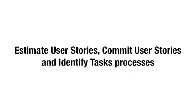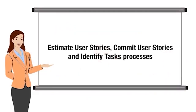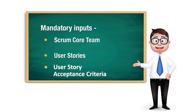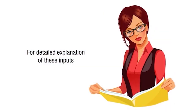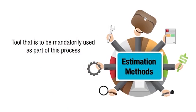Now let's look at the mandatory inputs, tools, and outputs of the Estimate and Commit User Stories process. The mandatory inputs are: Scrum Core Team, User Stories, and User Story Acceptance Criteria. The tool that is to be mandatorily used as part of this process is Estimation Methods. Numerous estimation methods can be used as tools to estimate user stories.